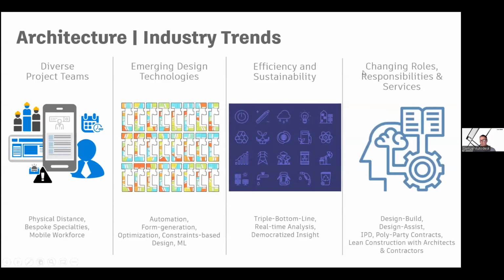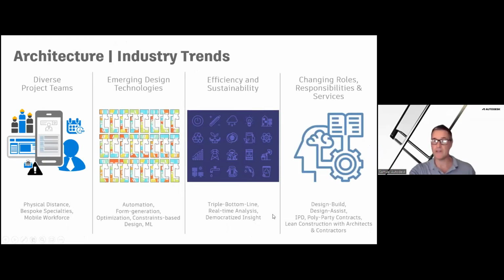So a lot of this in the UK. Here in Australia and in parts of New Zealand, there is still the design, bid, build procurement route. In the UK, it is design and build for a lot of the government projects. There's also a trend to move into IPD procurement, where everybody has an ownership or a liability around the data that's going out. So a lot of this is changing.